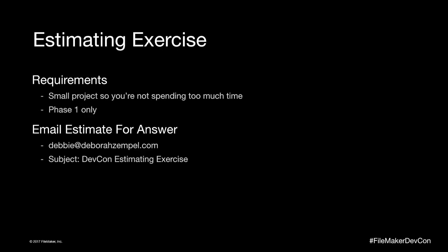So if they really only have $10,000 to $15,000 to work with, then my storyboard's not going to be as detailed. Well, the storyboard will still be detailed, but my estimate won't be broken out as much, because since I've been doing it for so many years, I don't have to break it out as much on a smaller project. If you're new to this, you may still have to do that. But the idea is, if the project's not that much, then you can probably get away with just a couple thousand of that going towards the storyboard. So it really depends on how big the project is. You're not going to invest as much time on a smaller project as you would a larger project.